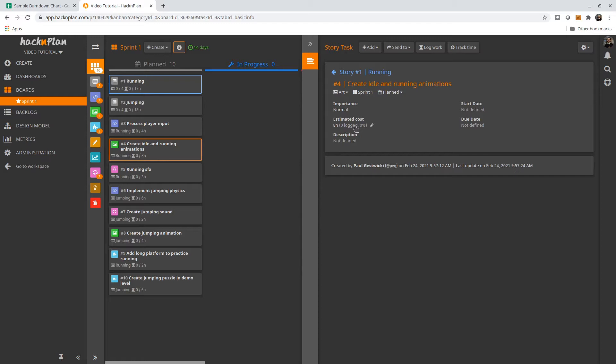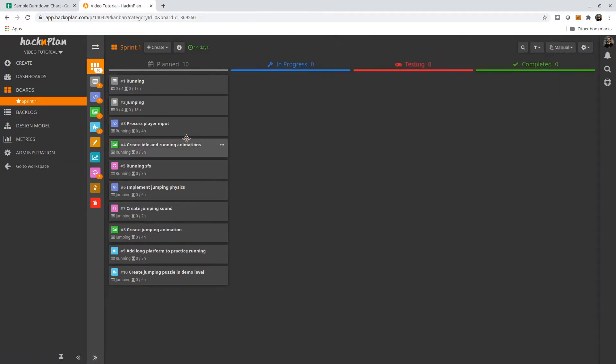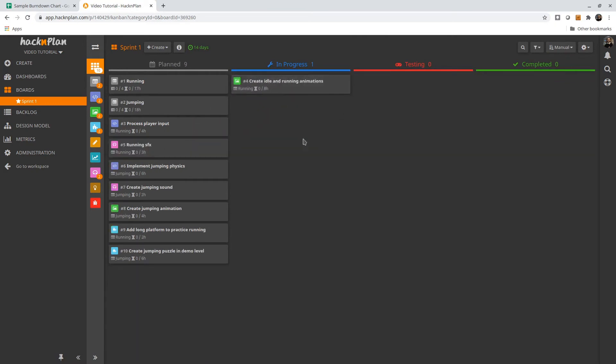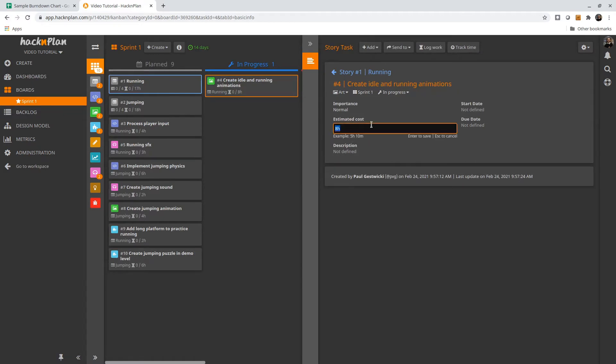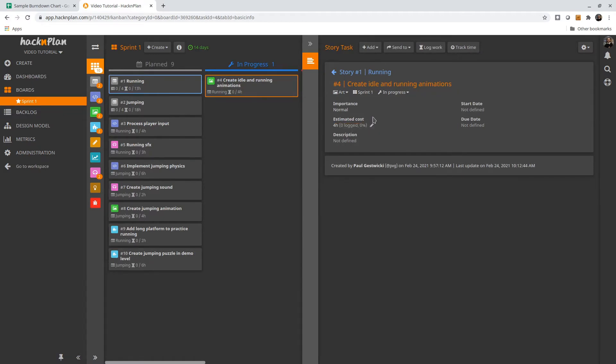On the other hand, if you track how much time is remaining, then you always know where you are relative to your goal. So let's say, for example, we started working on this task. We work on it for a bit, and we recognize there's four hours remaining. What I would do here is actually change the estimated cost.